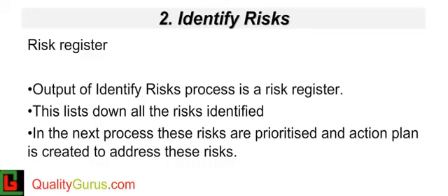The outcome of risk identification is a list of risks, or risk register. What is done with the list of risks depends on the nature of the risk. A few low-priority risks may be kept simply as a list of red flag items, and periodically monitored. Some high-priority risks may go through the rigorous process of assessment, analysis, mitigation and planning. The next risk management process, that is analyze risks, helps in deciding that.